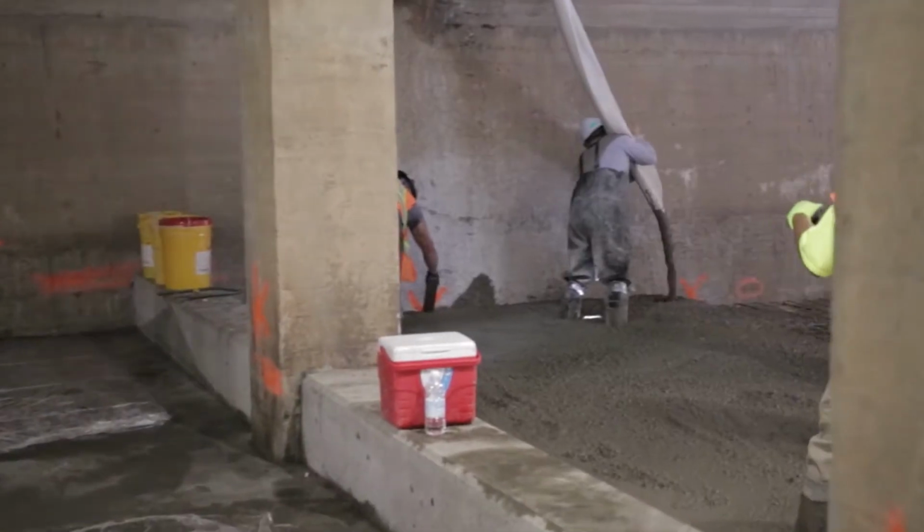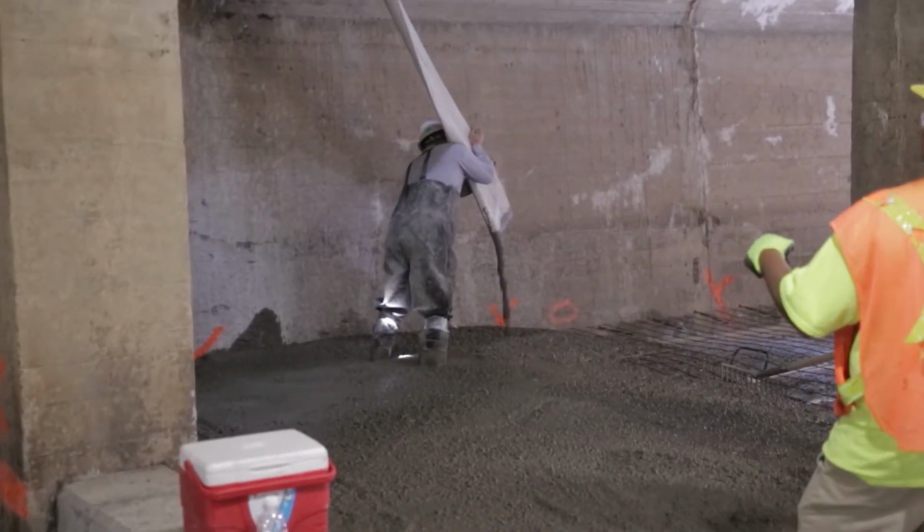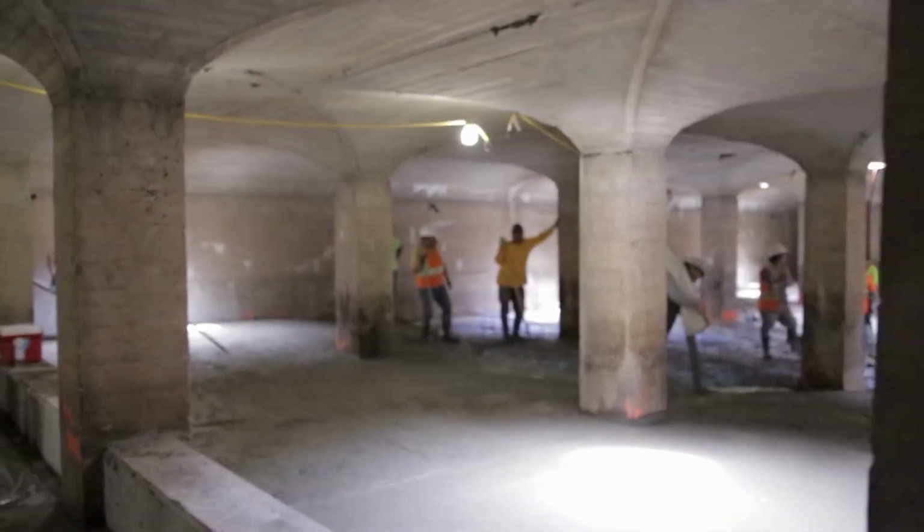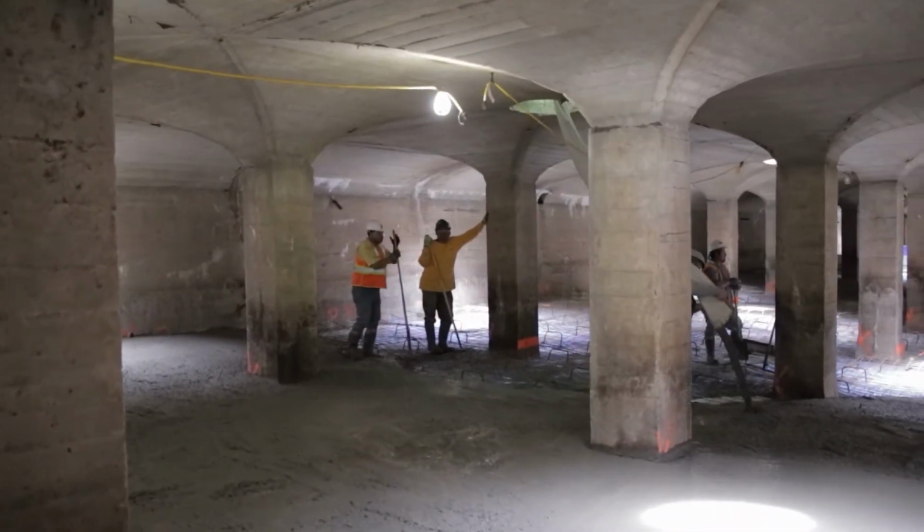What I was told is this is one of the first island projects that will be on schedule, if not ahead of schedule. So they're quite pleased with that. Up to this point, we haven't had any breaks that are suspect. We're all well over the design requirement within 7 days of breaking the cylinders. So from a testing perspective, everything's running right on track.